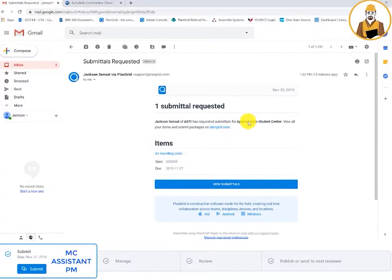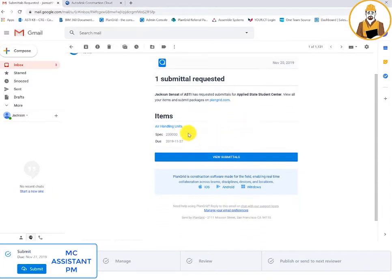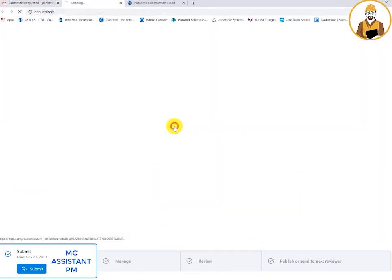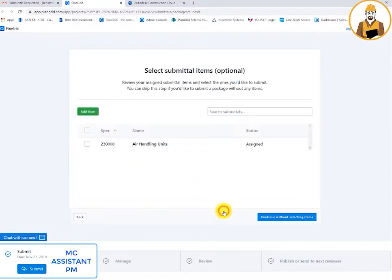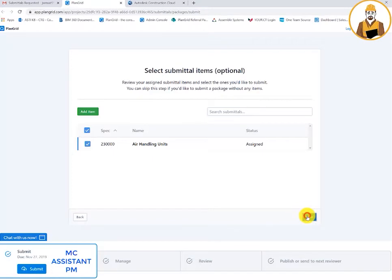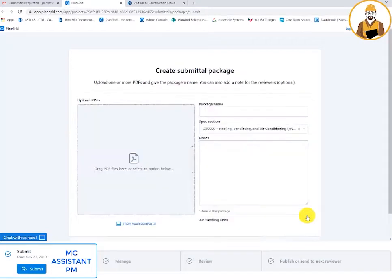When the submittal manager assigns a submittal, the assignee will receive an automatic email. The assignee does not have to have a PlanGrid account to attach a submittal item.